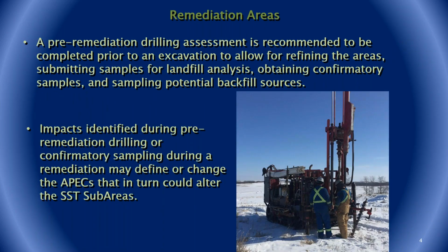A pre-remediation drilling assessment is recommended to be completed prior to an excavation to allow for refining of areas. This allows for submitting of samples for landfill analysis, obtaining confirmatory samples, and sampling potential backfill sources. Impacts identified during pre-remediation drilling or confirmatory sampling during a remediation may define or change the apex that in turn can alter the SST subareas.